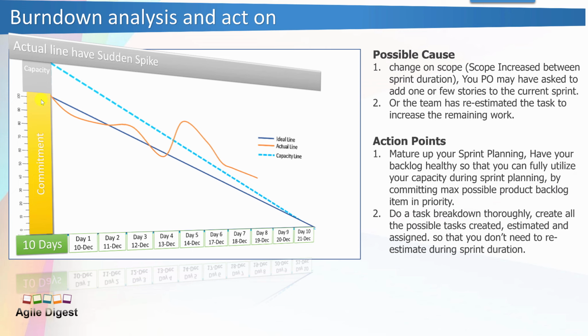Normally what happens is there are 2 team members. One is highly experienced in that particular domain, another is a newcomer. The highly experienced team member who needs 5 hours of work for one given story goes on leave or has a medical emergency. Another person who is new to the team or new to that particular domain or technology is the only person who can take it up, and he needs 15 hours of work, because they have 2 different technical levels, and the domain knowledge is also not on par. Those are the different situations that happen. So it's always better to keep some focus factor when you are doing your capacity planning.